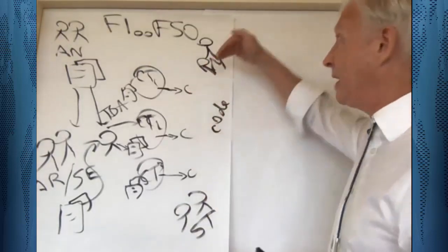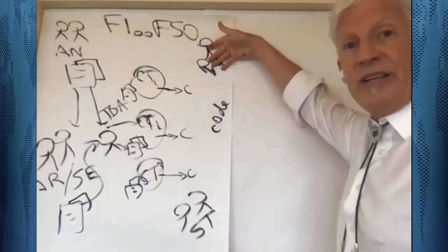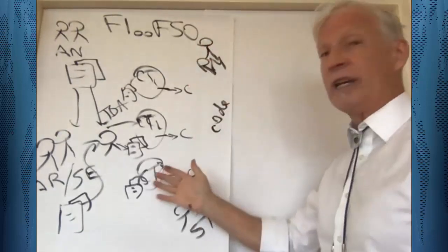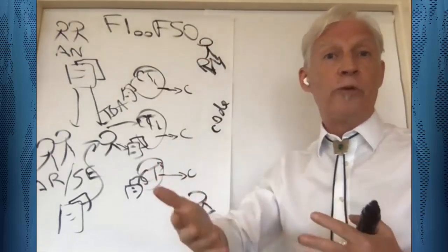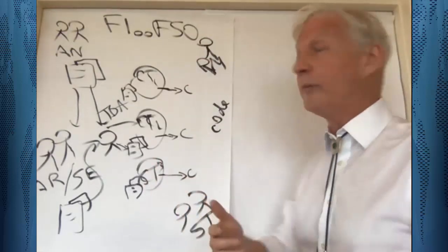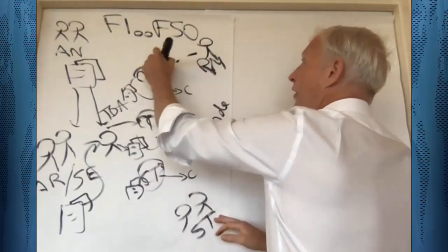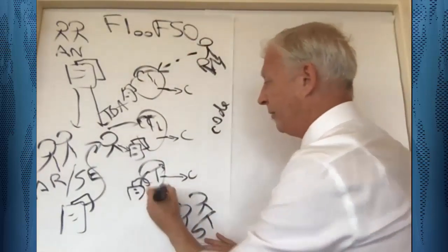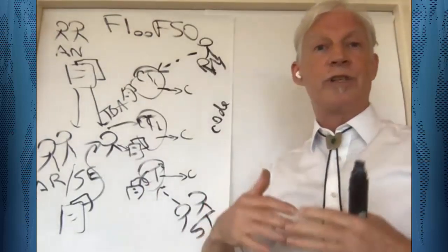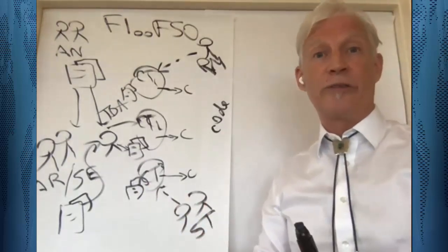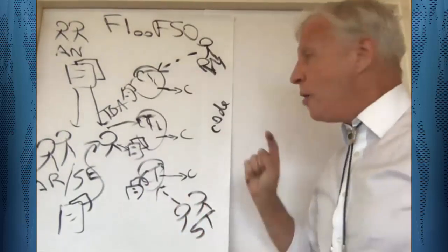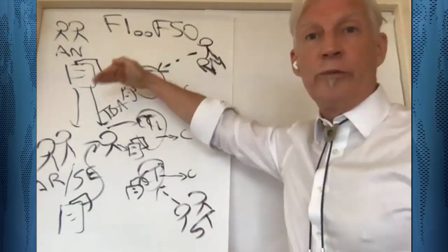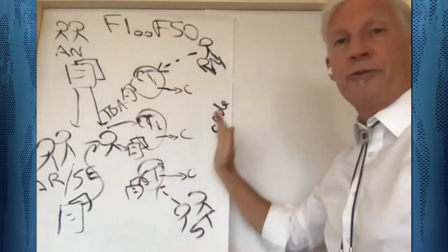Now, moving on, because the activities here of doing the integration and the testing won't go smoothly without problems, there will be problems. That means that there'll be sources of unplanned interruption back into the teams as well, which reduces effectiveness and predictability of processes. Moving on, notice that the work has been chopped up across a lot of different groups.